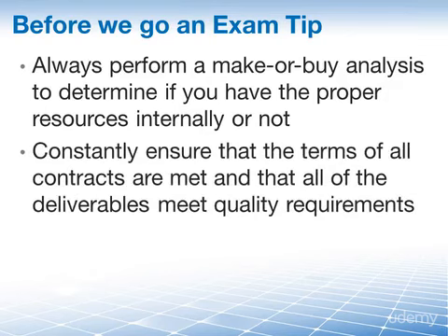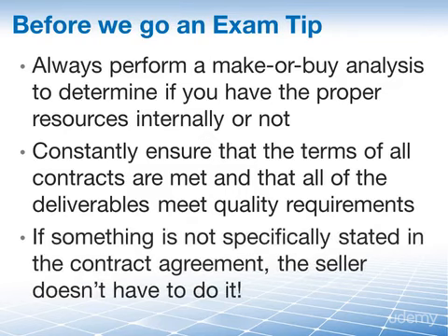Second, it's always important to ensure that the terms of any contract entered into on your project are always met and that the deliverables meet the quality requirements that are specified in the contract. And then third and final, always remember that if something is not specifically stated in the contract, then the seller doesn't have to do it because it wasn't stated in the contract. And this concludes our look at the control procurements process.